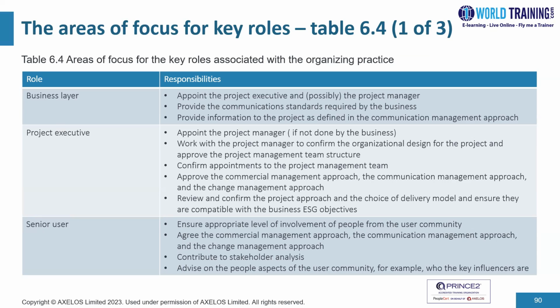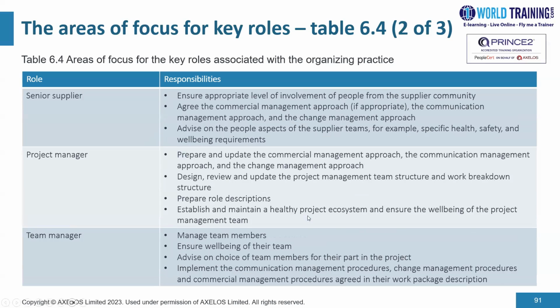Now, when it comes to senior supplier, the responsibilities would include ensuring appropriate levels of involvement of people from the supplier community, agreeing the commercial management approach, if appropriate, the comms management approach, and the change management approach. The senior supplier would also advise on the people aspects of the supplier teams, for example, specific health, safety, and well-being requirements.